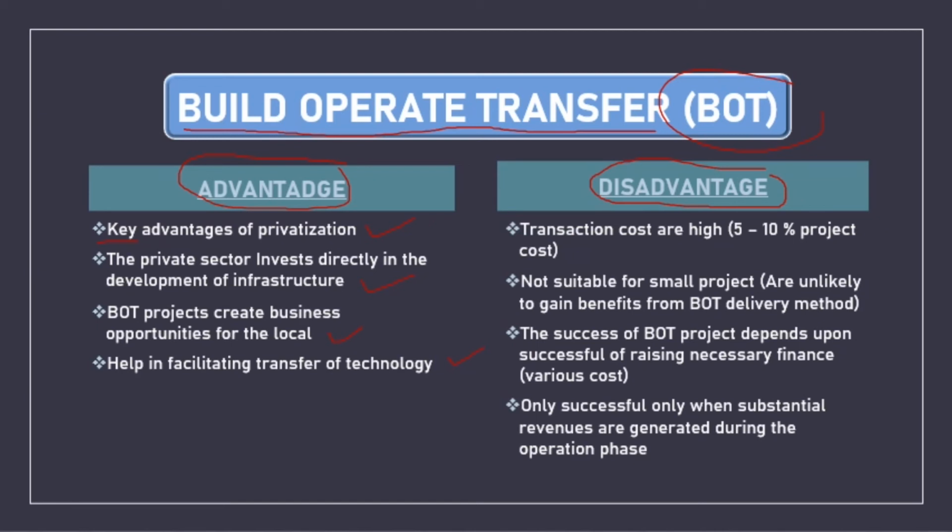Now let's take a look at the disadvantages of BOT. The first one is that the transaction costs are high, which is 5 to 10% of project costs, as has been mentioned in an article of public policy for private sector in 2000.